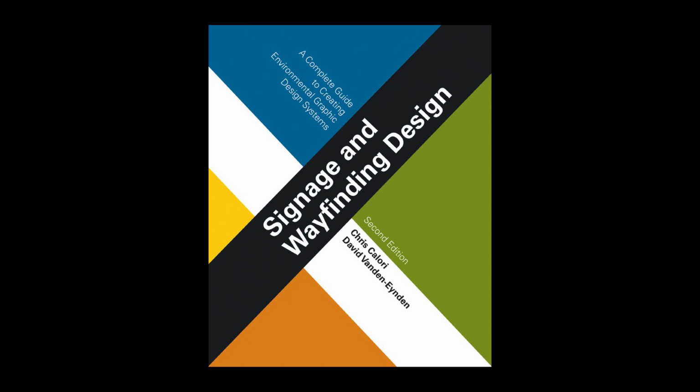Certainly, the designer's involvement may be limited in some of the activities listed to reduce design fees. But at the very least, the EG designer should review all of the fabricator's submittals, which include shop drawings and samples, during Phase 6. Coordination meetings.